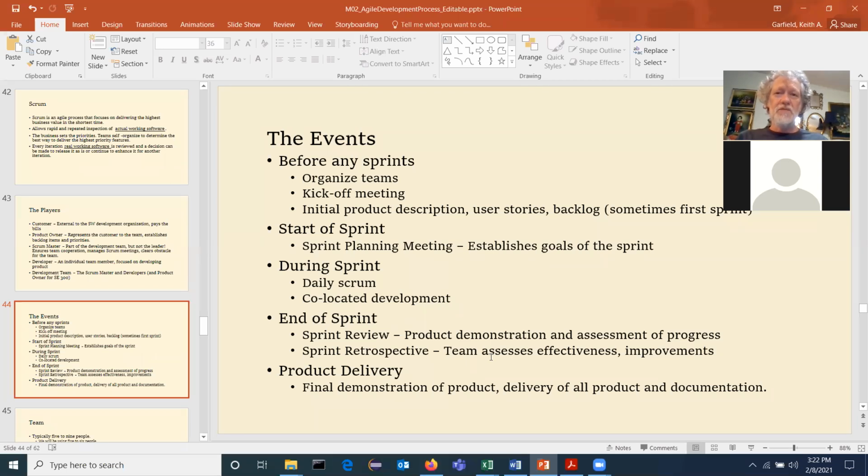And we found that initially we were meeting twice a week for 15 minutes and that wasn't enough. So we changed one to an hour-long meeting at the maximum. Usually it lasts about a half an hour, and one to a 15-minute. And for some reason, having that one half an hour together, we get a lot more work done. So that was something that, as a result of our retrospective, we determined. We also changed how we share documents as a result of our retrospective. So the whole point of the retrospective, by the way, sometimes you'll see the word reflection for that, is about assessing how the team works or doesn't work, and what needs to happen to improve the team cohesiveness and effectiveness.